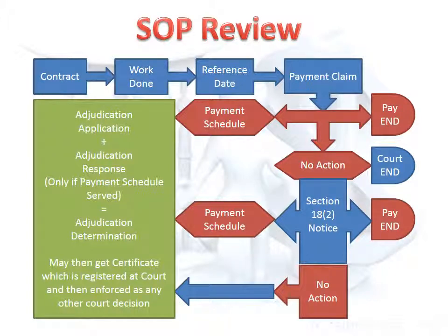To quickly recap the security of payment process in Victoria. Firstly, you need a building and construction contract. You need to have done the work or supplied the goods for which you are claiming payment. You need to have an entitlement to serve the payment claim under the contract or the Act. The client has 10 business days to respond with a payment schedule.